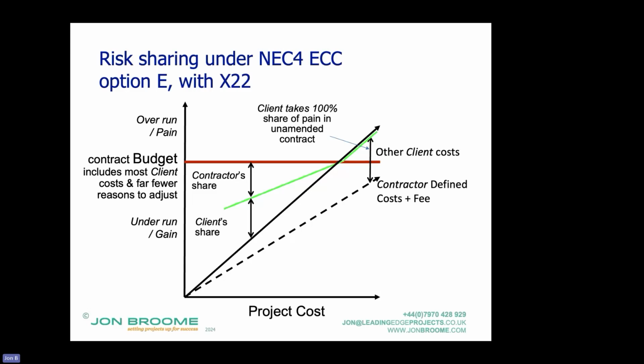It means that when a problem occurs, rather than the contractor going, oh, it's a compensation event, let's devote some effort to pushing up the target prices, they now go, providing we're in this range, there's no adjustment to the budget, so we might as well get on and minimize it. So it promotes collaboration, and around what's important to the client, which is their budget.